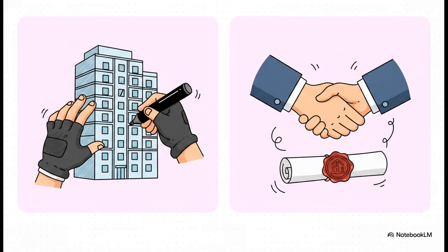And check out this classic maneuver. Contractors will often try to pad their income by throwing in unapproved change orders, variations, or claims to artificially increase revenue. So the crucial point is that AS7 dictates these variations can only be included in contract revenue when they are formally approved by the customer or if recovery is highly probable and measurable. A contractor cannot just bill for unauthorized extra work out of thin air to inflate their top line.